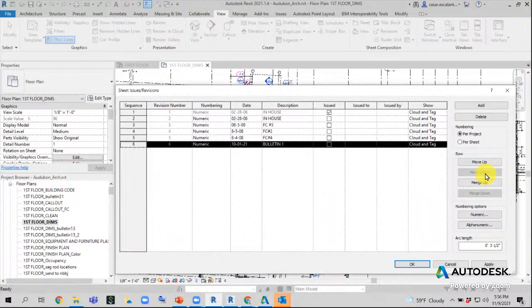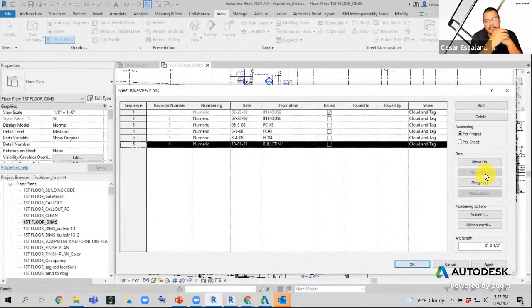A lot of municipalities are now requiring any changes to be submitted to them for review again. So sometimes in the past, we'd have up to 20 revision symbols or deltas. And then in reality for the city, we only want 3. So this is a tricky thing that we have to start thinking about. Yeah, that's right.